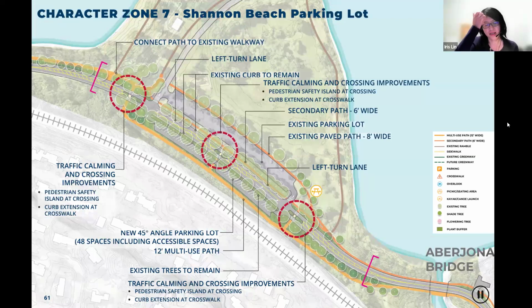I would think that the new parking is much more needed than a new driving lane, because the through traffic data that we understand, the traffic volume is not that big, but there's a greater need for the parking here. And also we would try to save the existing trees along the eastern curb line. That's our intent as well. And for areas south of Shannon Beach, we actually looked at utilizing the area east of the curb line. There's significant cultural resources that would make it very difficult to permit the project east of the existing curb line for the Parkway, and that's a permitting consideration that we had for expanding it east where possible.